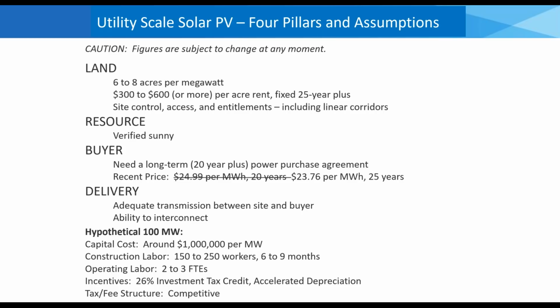I would also emphasize to that end that as you begin to structure documents, even as the developer structures documents, those documents may actually need to change, such as assignability of agreements or transferability of agreements. There has to be some flexibility there because, in fact, things do change over time. Investors have specific requirements and so forth. So as you get into a specific project, it's probably going to look considerably different by the time you actually finally get it built and operated.